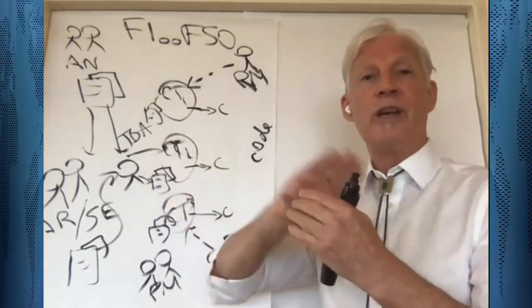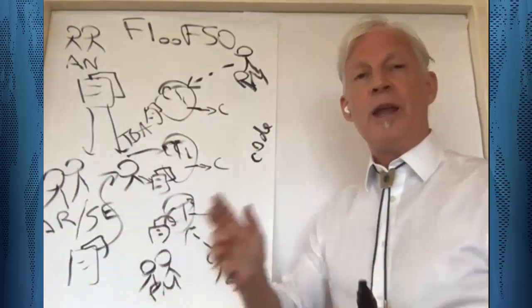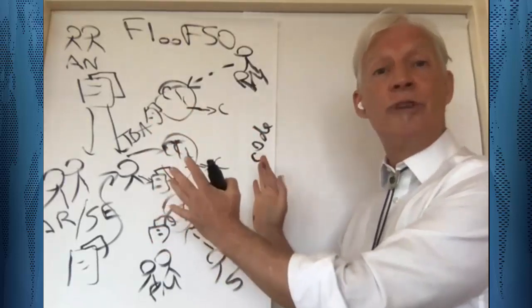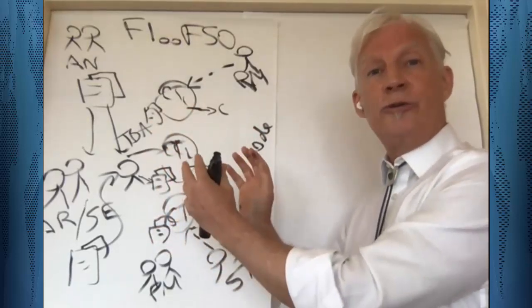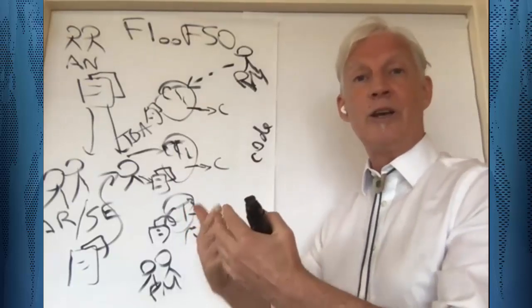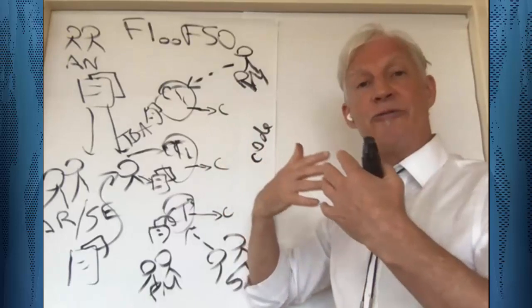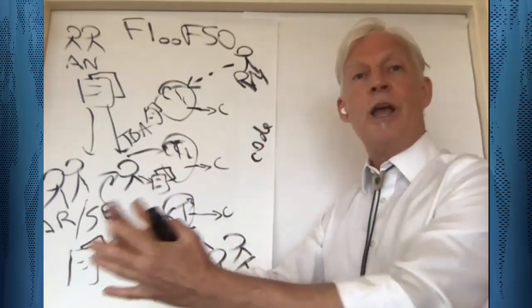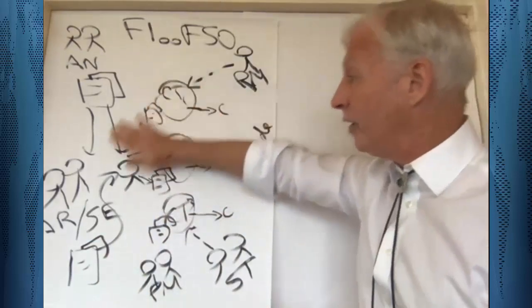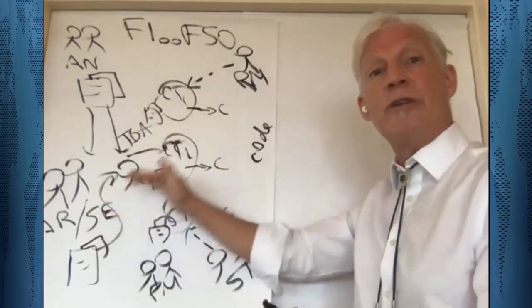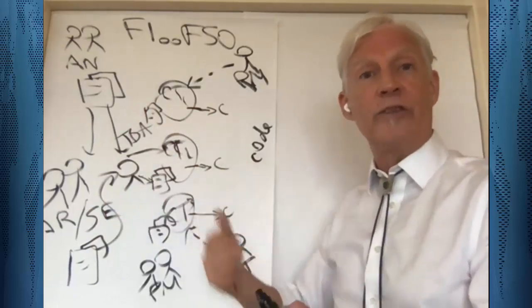They can do everything front to back. Now, if you simplify the organizational design, if you descale it to feature teams where each team can independently take on a feature and then from analysis all the way to delivery do everything, the implication of that is the elimination of all of these single function groups, the elimination of all of the handoff and wastes and delays that go along with that,